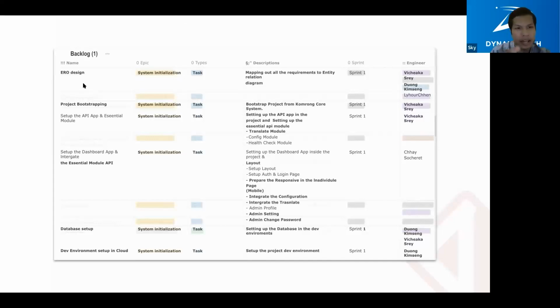So we have this and we can design the name of our task. For example, we can see here the epic. Epic is like the difficulty level of that task, and the tab is the test, and the description about the test, and the sprint. Sprint here means the timeline of that task. So we could consider one sprint as 2 weeks. Which means this task we should deliver in one sprint. I mean this task takes one sprint to deliver. So one sprint depends, or we could consider it 2 weeks. 2 weeks is called one sprint.